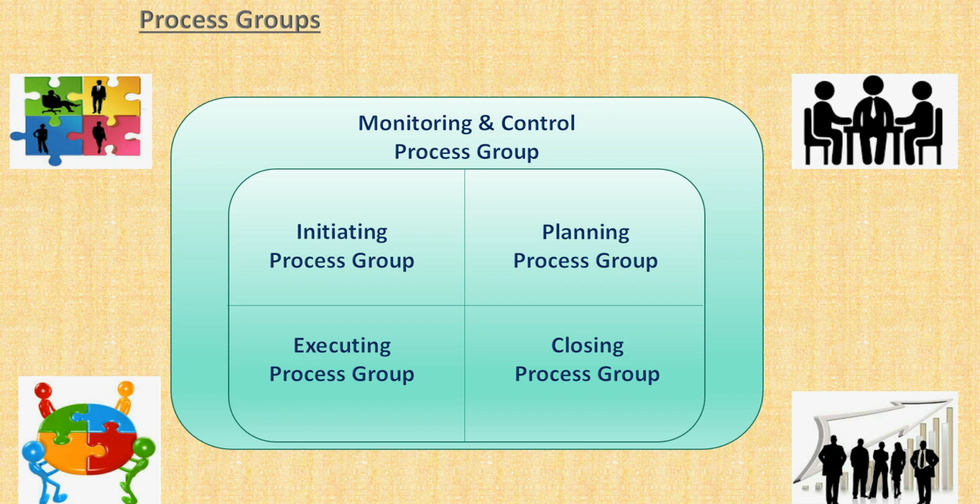You should not think in a way that the initiating process group comes first, the planning process group comes second. No. All process groups are there in your project management, like the project life cycle. Some processes will be happening earlier. Some processes will be taken care of at the later part of the project. But these are overlapping, iterative processes, right?